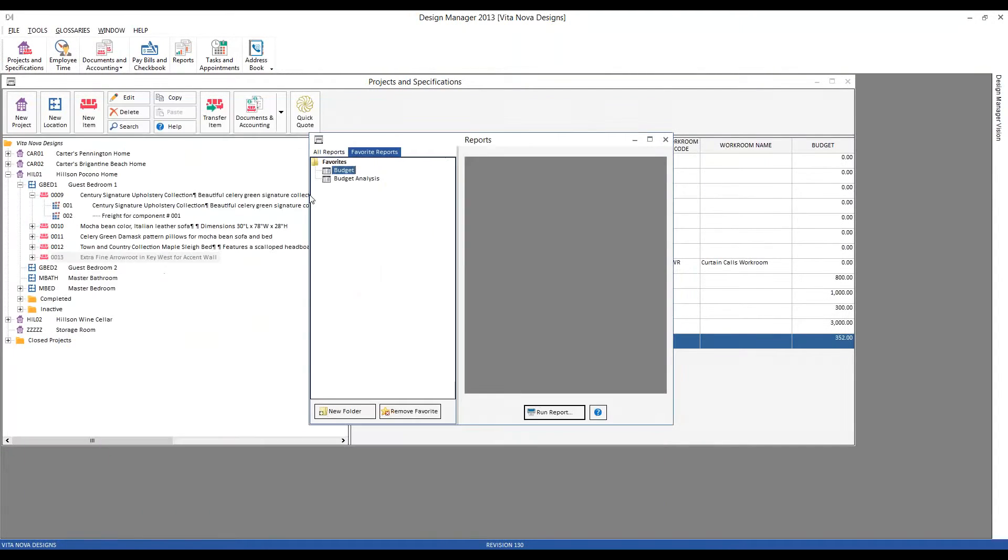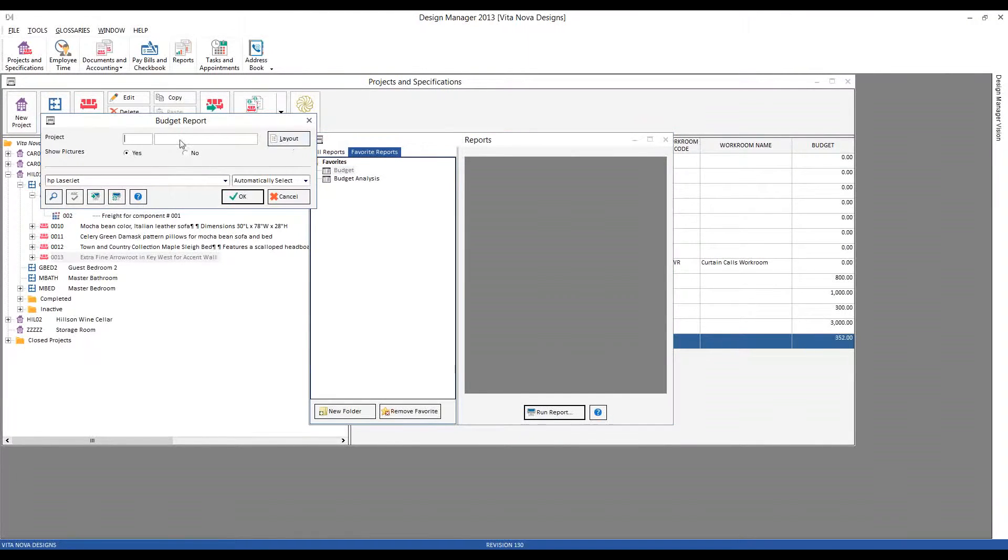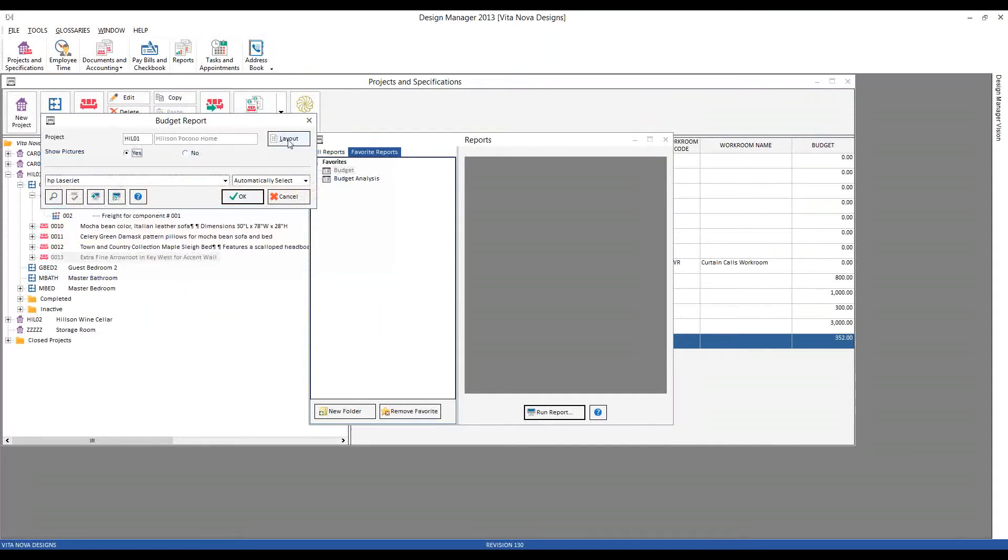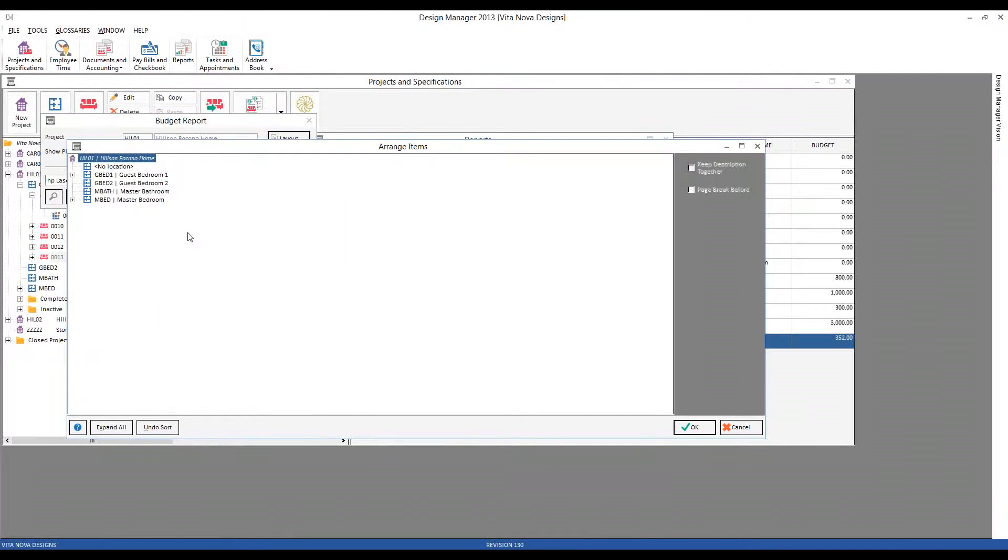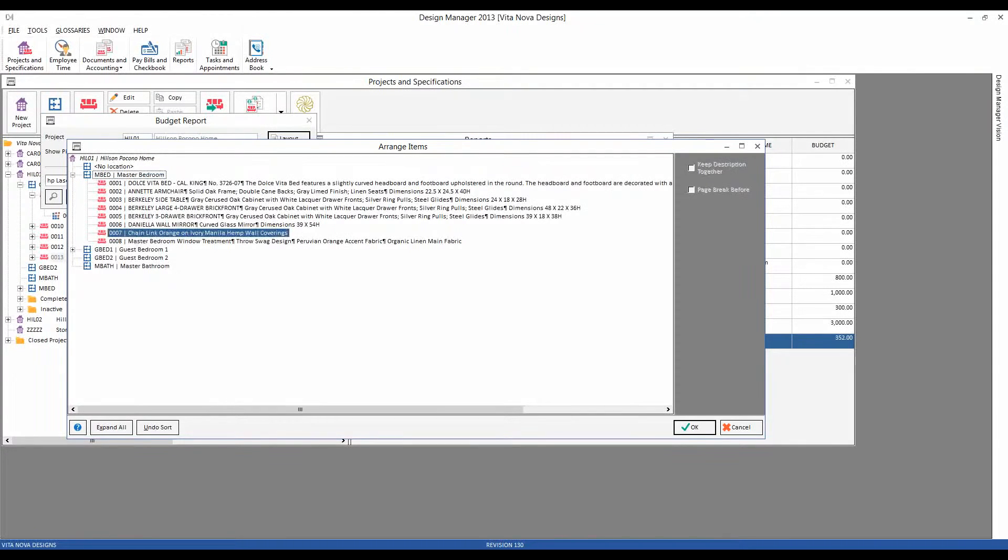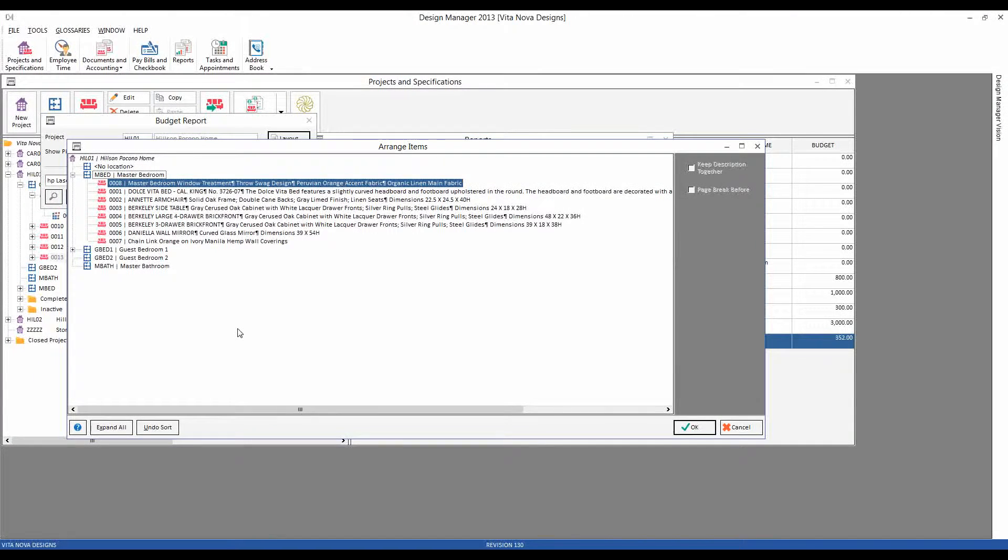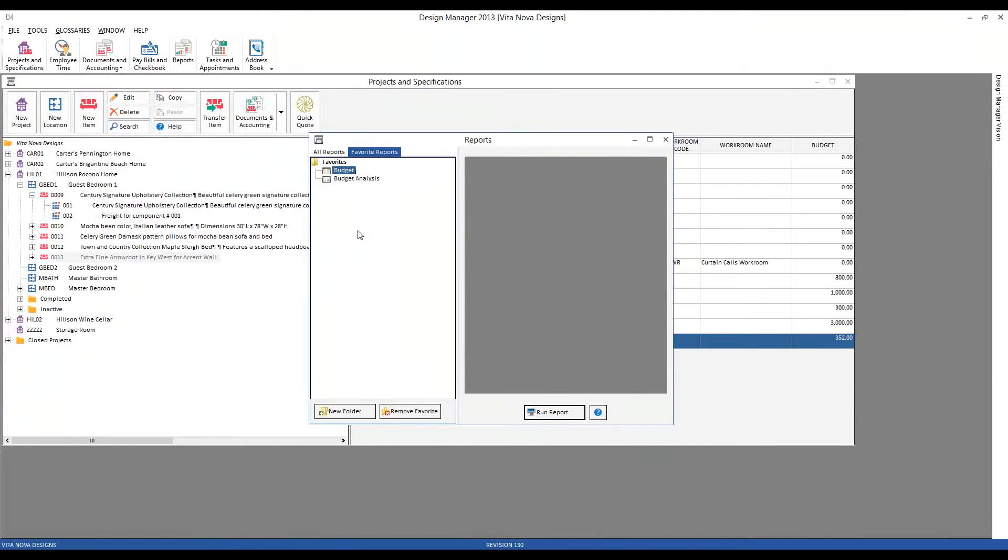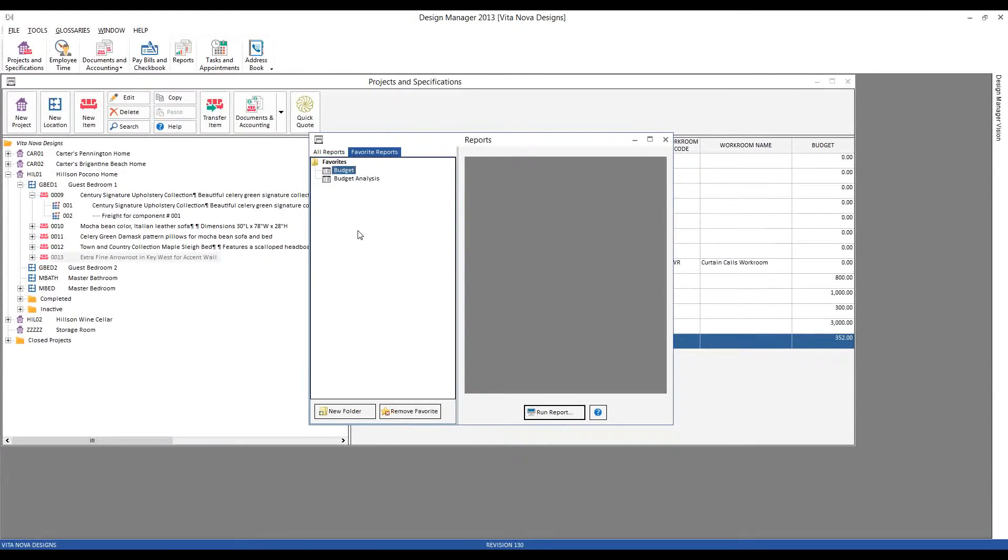And as we begin to add our specifications for the other locations, the items would appear there as well. Lastly, notice that we can also use our layout window. So we could arrange our locations or items within a location in any manner that we desire. And this will continue forward onto our proposal and even our invoices for consistency throughout the documentation of the project. So, Design Manager can be used to record budgets both at the project and location level to create a nice preliminary budget. Then we can further refine the budget by adding the design concepts into each location within their own budget and monitoring the location's budgetary limits and the projects as well.